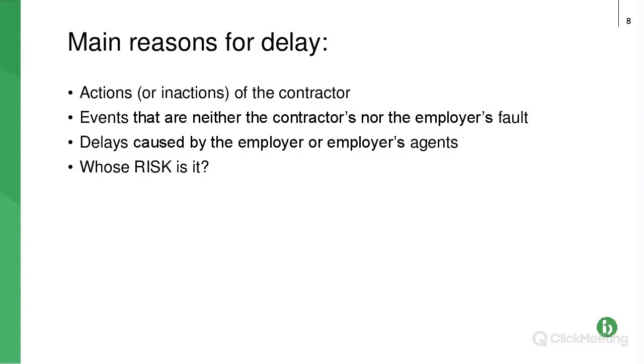Third parties, so genuine third parties, not the contractors or subcontractors, because they are the responsibility of the contractor, and not a project manager under NEC, because they usually are the responsibility of the employer. But for example, statutory undertakers, the water board, the electricity board, the local authority, the planning authority, they all sit in this mid-ground where neither employer nor contractor has any real authority to get them moving if they're causing a delay. So who takes the risk of all these people?